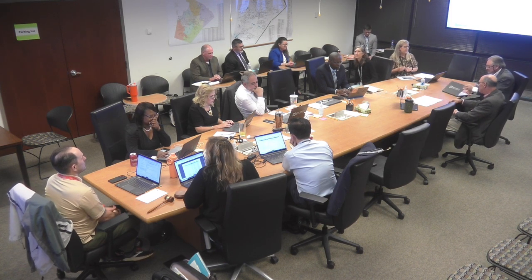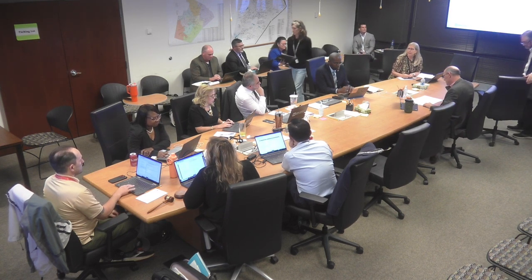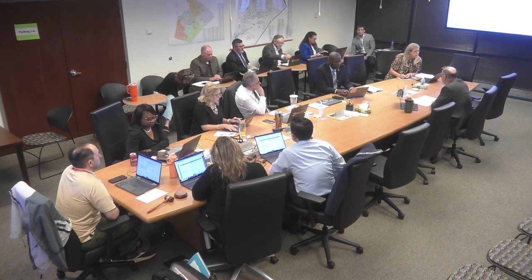Yes, we are very excited about this project. We are going to Fuquay Elementary School. In order to do the project, we are going to need to swing these students out of this school. So we have the opportunity to swing the Fuquay Varina students from Fuquay Varina Elementary into Hilltop Nemours in January of 2025. They will remain at Hilltop Nemours until June of 2026.